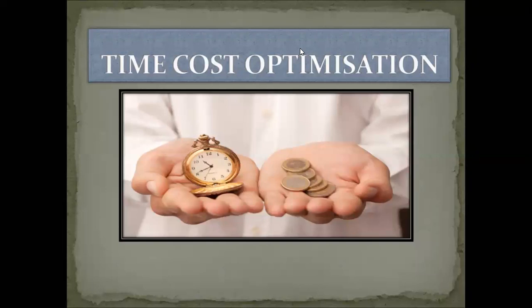Your earlier duration of the project was 15 months, and for that 25 lakh is required. But to finish that project early, if you increase the number of labors for 4 months, and because of that your work is finished 3 months early, that means instead of 15 months it is completed in 12 months, but you have to pay 1,80,000 more.